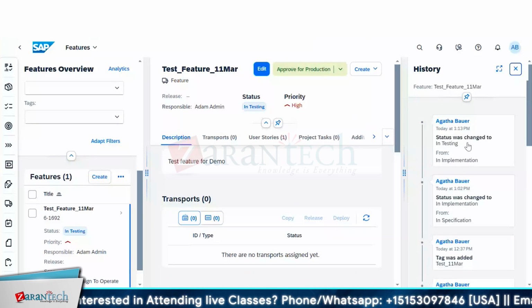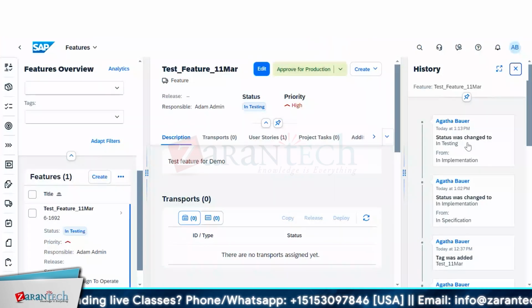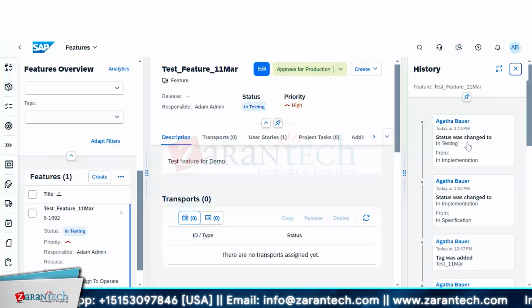That's right. But because there is only one status right now, in that status only, when you are testing, you'll have to keep the feature as it is, even if it's taking time or you're waiting, as you're saying, for a dependent feature. Until that is moved or is in testing, you can't test the other features. So the preceding feature would remain in testing for a longer period, and you can mention in the comments or description that it is waiting for this. Once the succeeding feature or development is in the system, you can run the testing cycle.